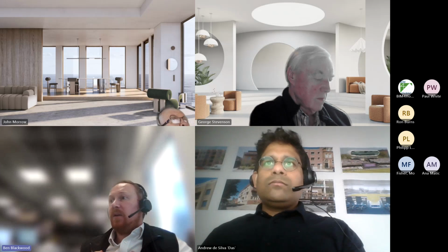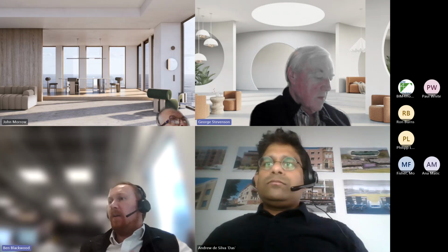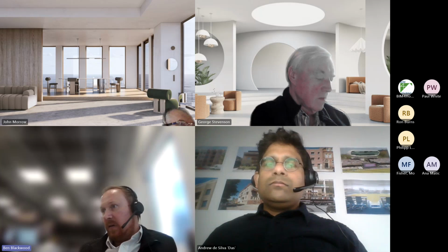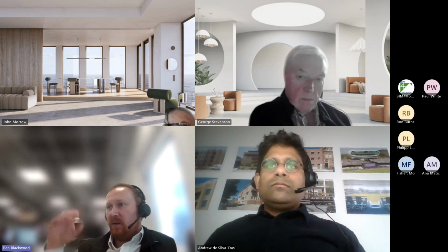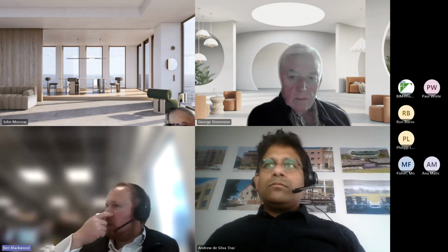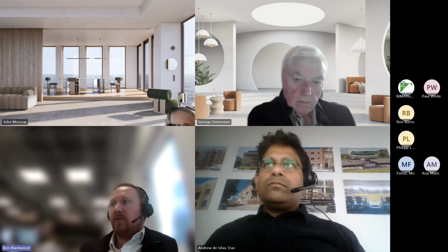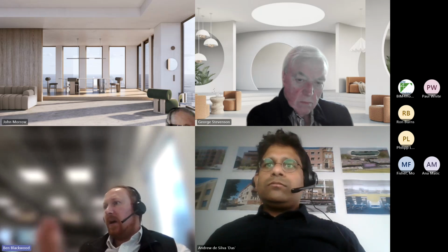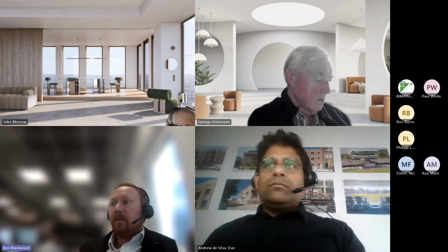But I'm happy to look at things that are incomplete, but you have to tell me what's incomplete. And I get them to fill out a tracker, which basically follows the principles of the golden thread and regulation 38, and we have an agreed structure that the responsible person has agreed with the construction manager so that they can find the information afterwards. And we populate everything and hyperlink it all through.